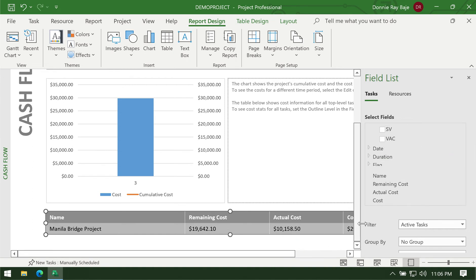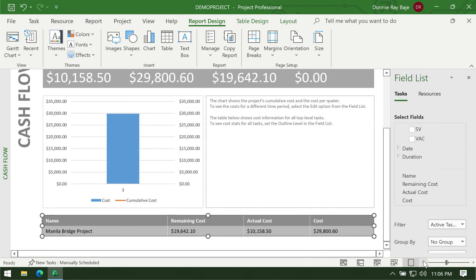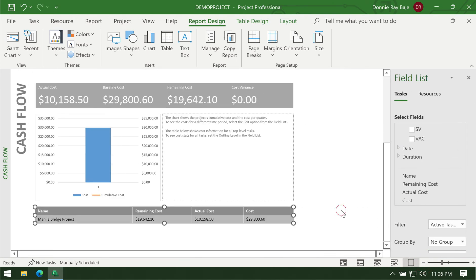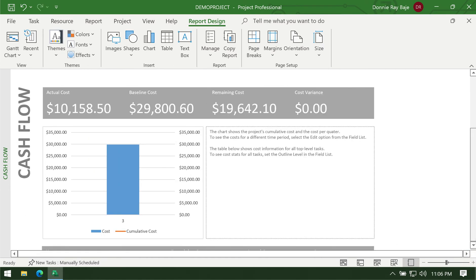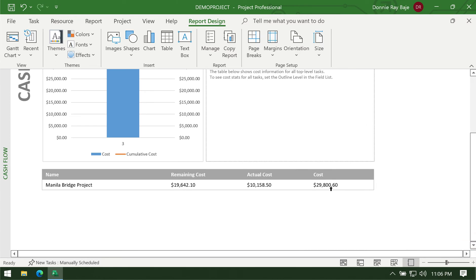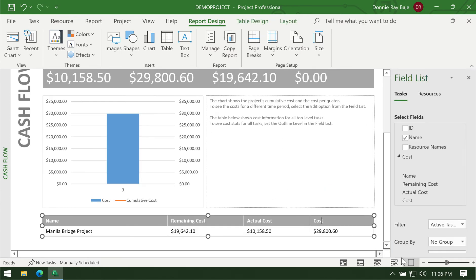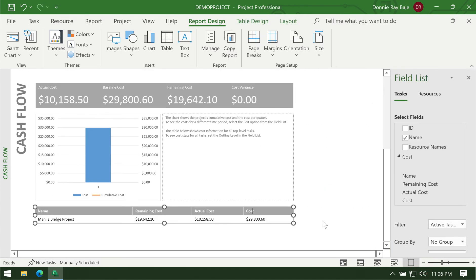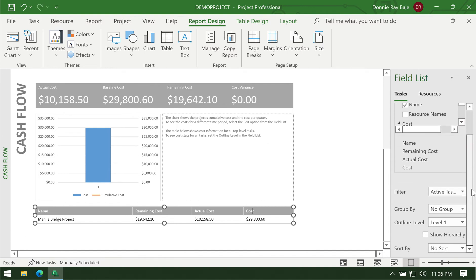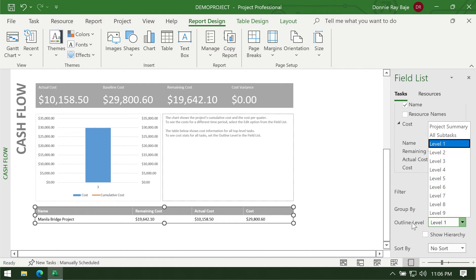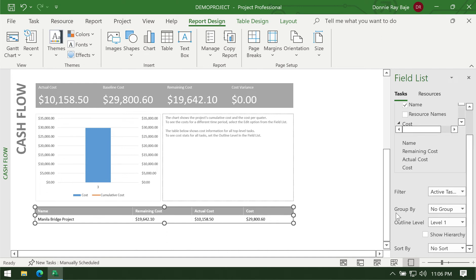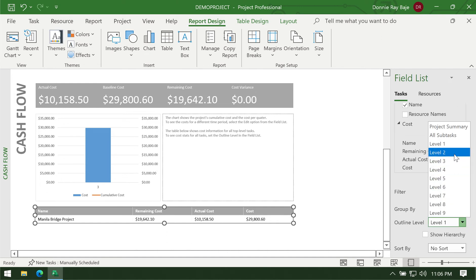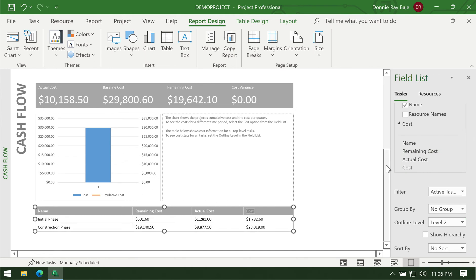Another thing is if you notice the report is not that detailed, right? It only shows you the overview cost. But what if I want to also see the cost per phase of the project? For that you have to click on the table, and here on the right side pane you should see there's an outline level which is currently set at level one. That is the reason why we're only seeing the level one or the project level of the costs with a cost report. If I drop this down and change this to level two, you will see that we now have broken down that table into the two levels or the two phases that we have: the initial phase and the construction phase.